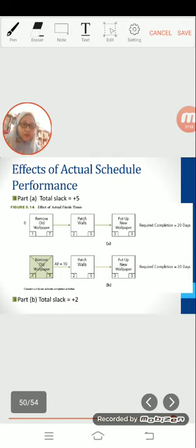First of all, part A is the plan, the first plan. Part B is what actually happened. In part A, you can see that removing all wallpaper takes 7 days. But actually, the AF, actual finish, is 10 days. It means it needed 3 more days.